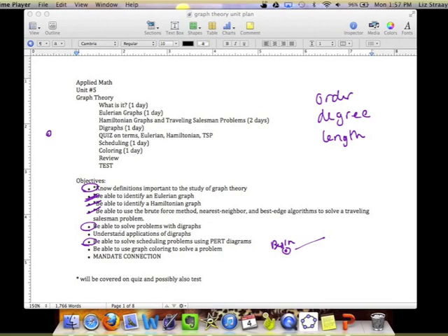And then from there, what task can we do? I could do task 1, and maybe that one takes 2 weeks. And I could do task 2, and maybe that takes 4 weeks. And I could do task 3, and maybe that one only takes 1 week. Then maybe task 4 is dependent on tasks 1 and 2 being done. And maybe that one takes only 1 week. Okay, and we create out that diagram based on what needs to be done from one level to the next based on their prereqs.